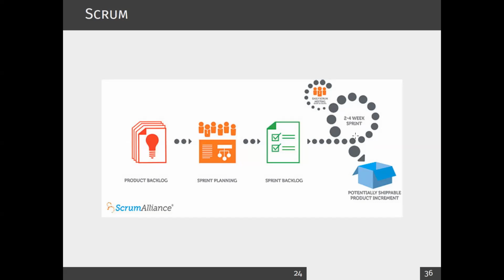right? And once they have finished, they have another session which is called sprint retrospective, which means, again, after the sprint review and before their sprint planning, right? They discuss their work. They look for improvement, especially for the next cycle, right? So this is usually how Scrum works.